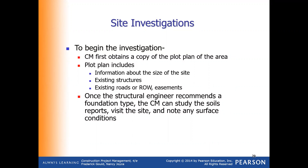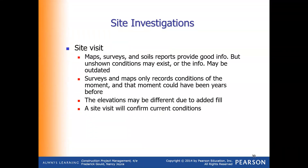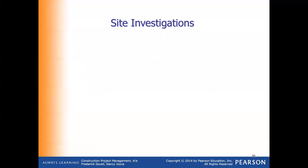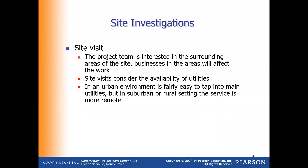Why do we care about existing structures? Because these existing structures could alter the design and the foundation design. Those are things we need to be looking at to recommend to the structural engineers the type of foundation. Now, the means and method tools we typically use to make a site assessment are maps, surveys, and soil reports — and those are good and they record conditions at the moment. But the problem is we don't know if that moment was a year ago, five or ten years ago — in other words, they're not up to date. Therefore, we need to make a physical site investigation visit and assessment.